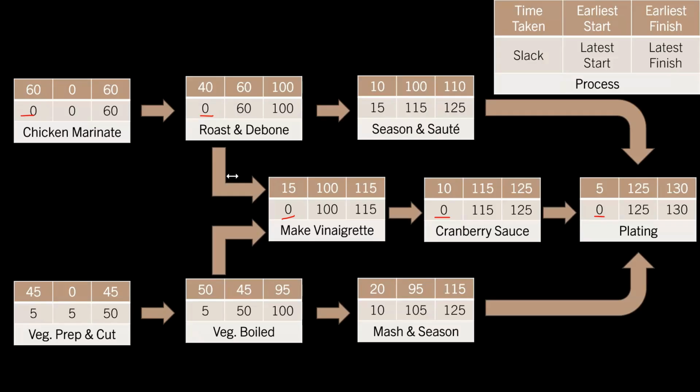But I want you to understand that whenever you have LRDI sets in which processes and individual timings are given, and you have to figure out the total time of all the processes coming together to form a common output, make the network diagram, and you will be able to figure out earliest start, earliest finish, latest start, latest finish by following this particular process. Quickly, the answers to this question.